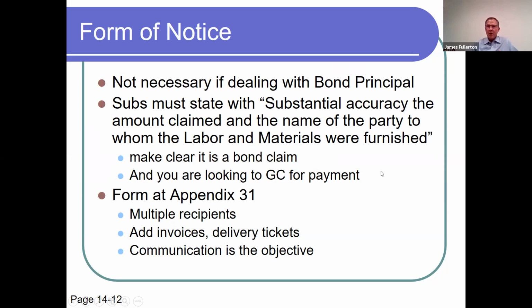You have to know who to send the notice to. And I've had cases where my client, the supplier, if it's an inexperienced supplier, doesn't even know who the GC is. That makes it impossible to send the GC notice. And so you're essentially waiving payment bond rights for no good reason by not having any idea who the GC is.